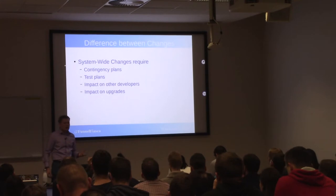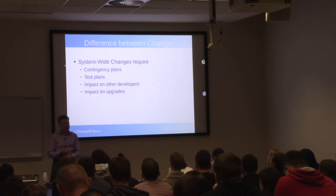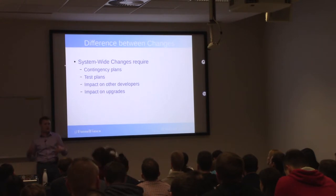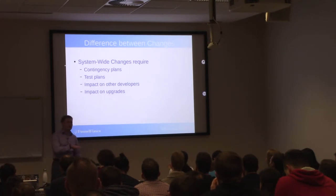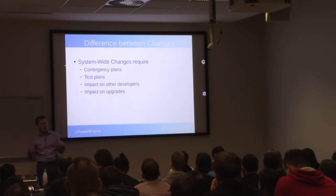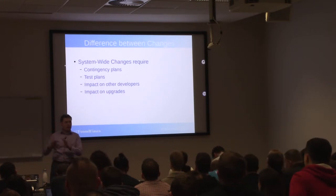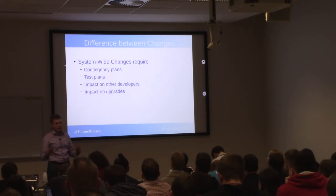System-wide and self-contained changes are fairly similar, but we have a little bit more for system-wide changes because of their bigger impact. Those are required to have a contingency plan, a test plan, and lists of the impact on other developers and on upgrades — for example, if a user is going from Fedora 28 to Fedora 29, will your change break them, or make it impossible to revert? These are all things that are very important to know about. It's not "you can't do this because it has an impact" — we just need to know about it and plan for it.